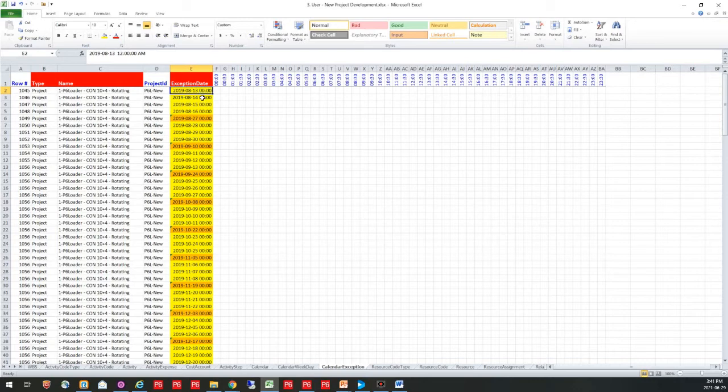using formulas. So I'm adding on each one, and then on my next time off period, I have actually said, add 11 days to this, and then I'm going to use that again to increment my days. So a lot easier using a formula, a lot more accurate when you are building out these calendar dates that are exceptions.